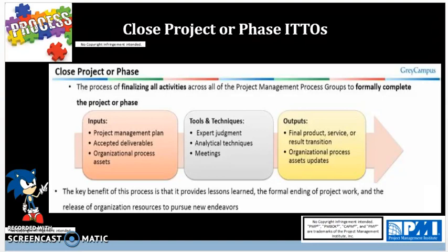So you need to make sure to tie off all loose ends with external vendors and suppliers in the project, and specifically the last date of service, to ensure no money is being lost due to miscommunication between your project team and the vendor. So that's important to tie off the loose ends. Also, we have administrative closure.